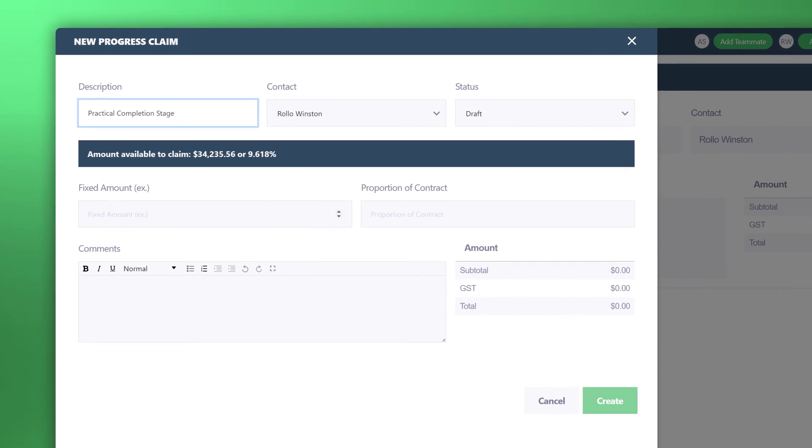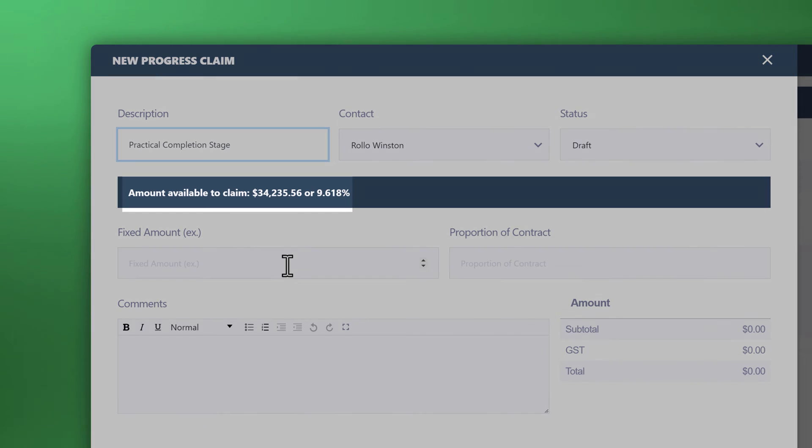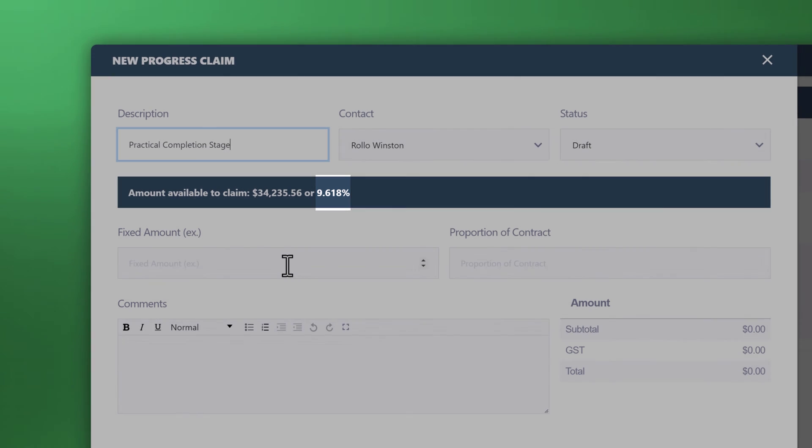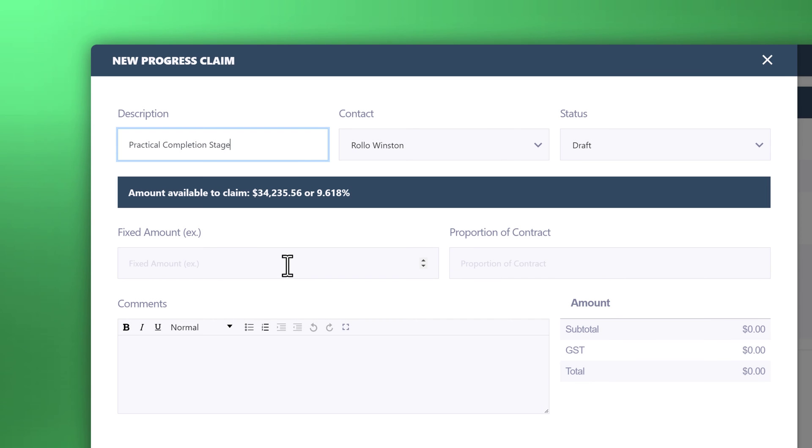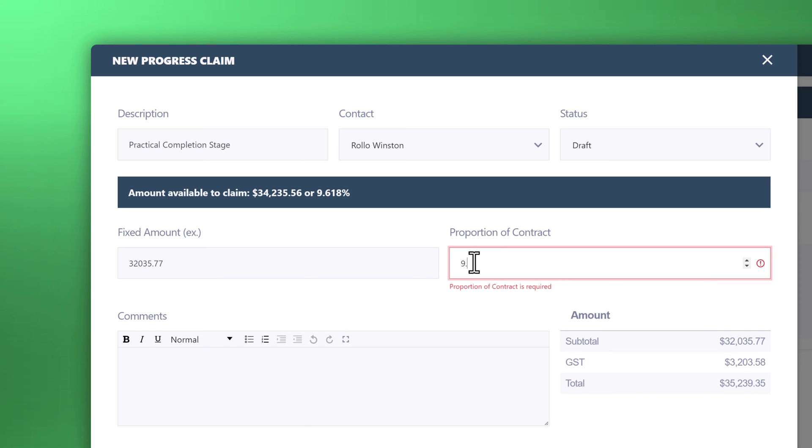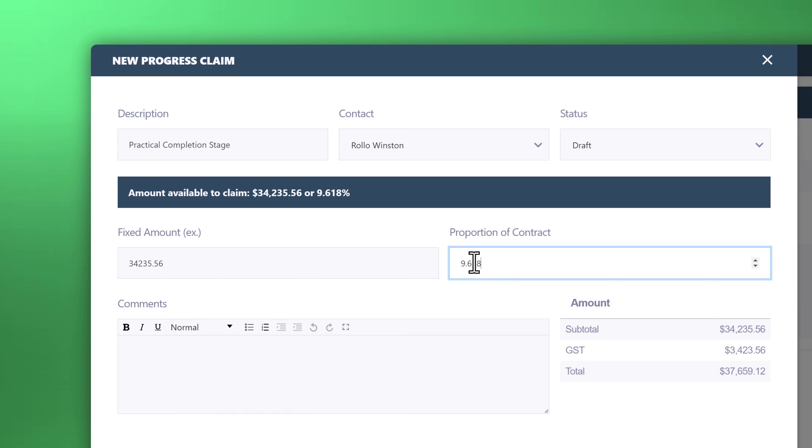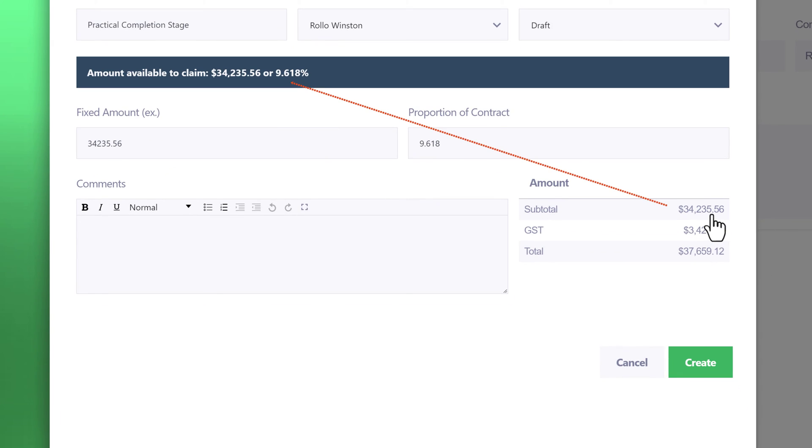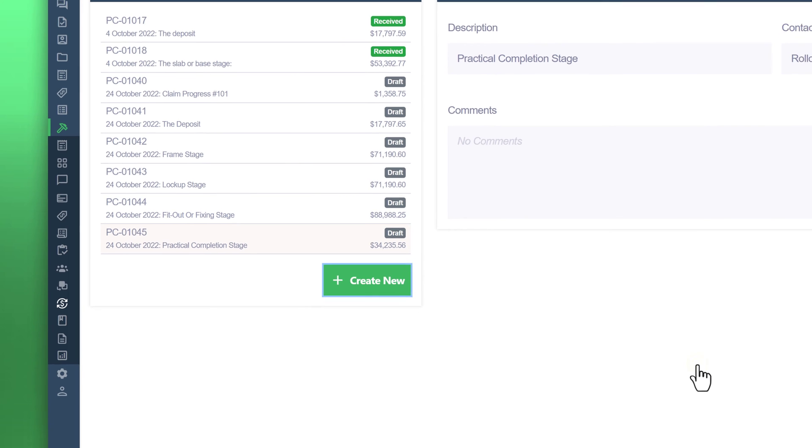For this last one which was the practical completion stage, you'll notice here in this little box it states amount available to claim $34,000 or 9.6%. It gives you an indication of how much is left remaining. All the other items in progress claim that are in draft are essentially calculated against the contract value. This ensures that you don't under bill or over bill yourself or the customer. Let's enter 9.6%. You can see that there. That's the amount that matches up with the amount available to claim. Click on create.